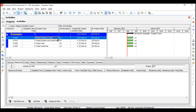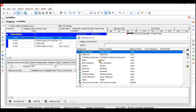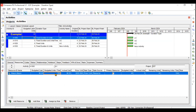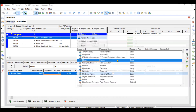For the very first case, the original duration is four days. I am adding one resource — one mason — to this activity. You see the mason's budgeted units per time is 10 per day, and budgeted labor units become 40 because the activity is four days and hours per day is 10. Even if I assign one more labor to this activity, it will not change the units and duration. The budgeted labor units remain 40. Let us try to assign one more mason to this activity.